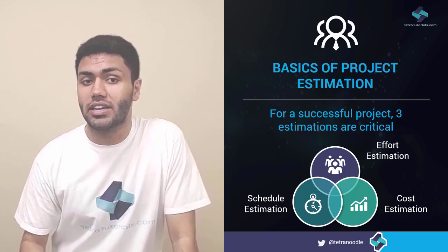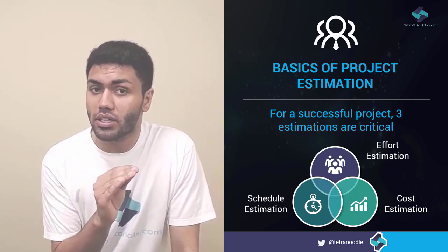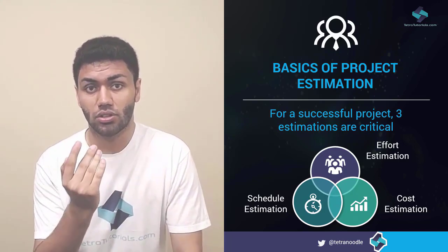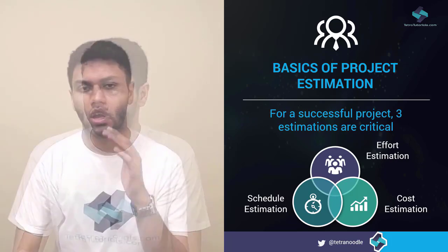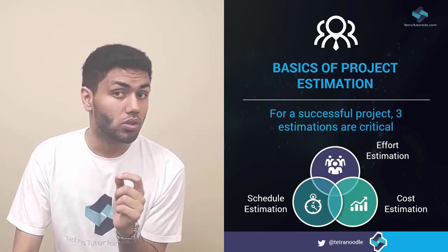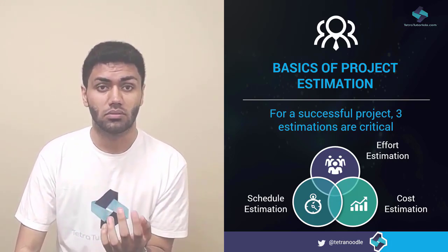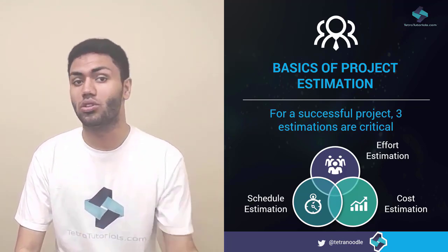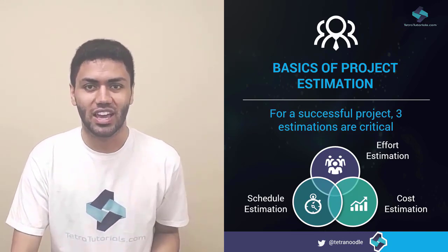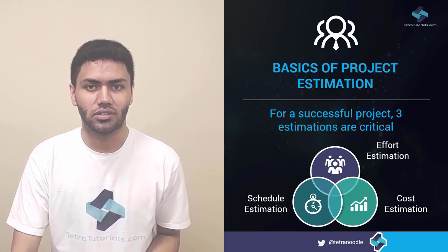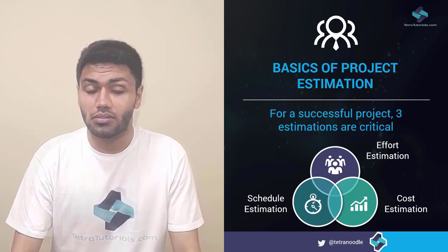The schedule estimation is the estimation of the amount of time needed to complete the project. The timelines include all the activities involved in the execution of the project, like project planning, implementations, testing, and so on. A word of caution here, you also need to keep a watch on holidays, vacation plans for the team while estimating the timelines. Apart from these, there may be external dependencies that can impact the schedule. For example, if you need a server for testing activities, and if the delivery of the server is going to take 2 weeks, then that time also needs to be included in your estimate for timelines.